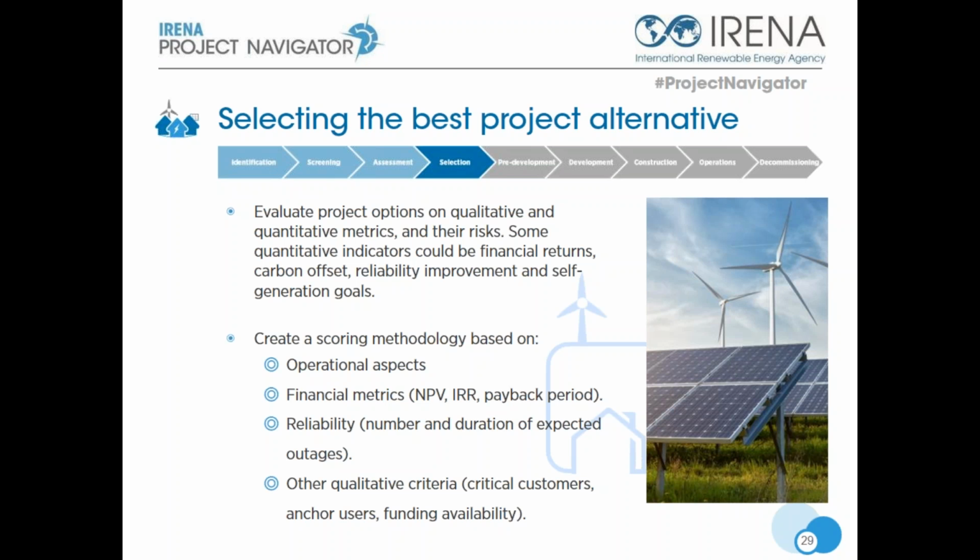different weighing factors for individual performance criteria, and these criteria may include operational aspects, financial aspects such as the net present value, the return on investment, and the payback period, reliability of a project, and other qualitative criteria such as the critical infrastructure customers, anchor energy users, viability gap funding, and financing sources.